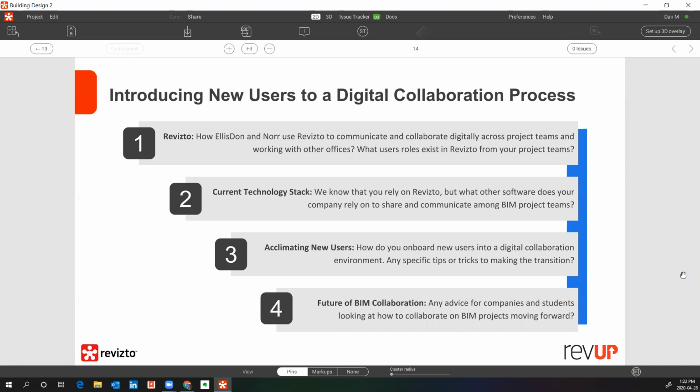Yeah. So typically, during construction, we bring all our sub-trades on board, and we have a BIM kickoff meeting where we sit down together and talk about what software we're using, and what collaboration procedures we want to put in place to manage the BIM process during construction and fabrication.